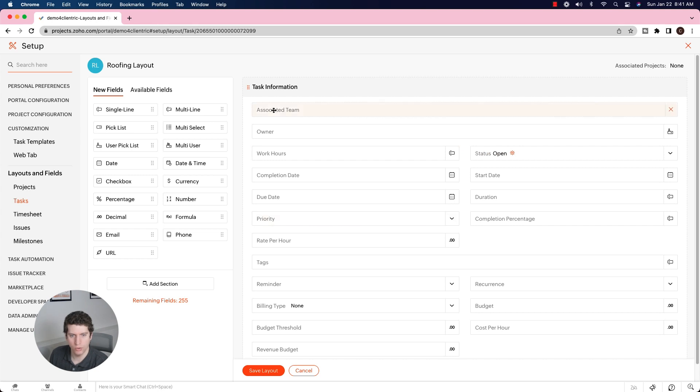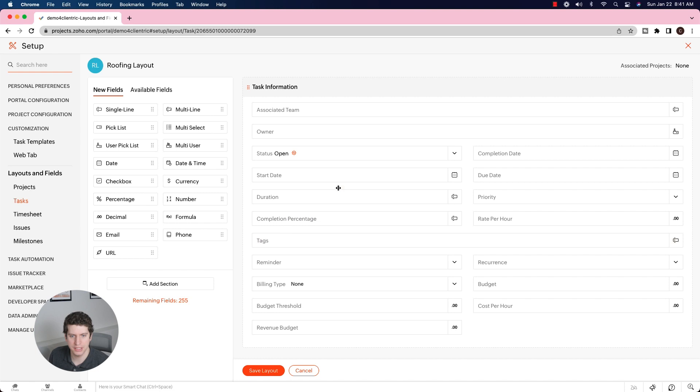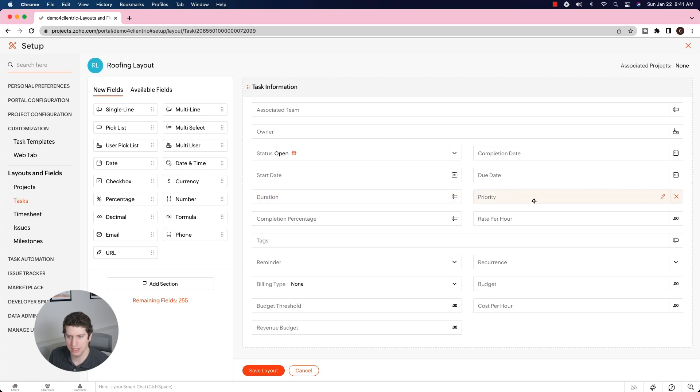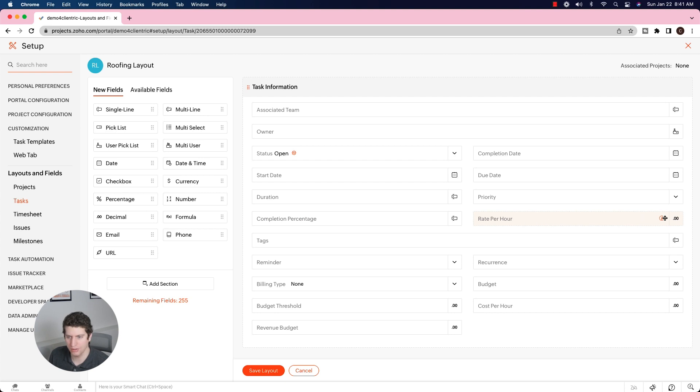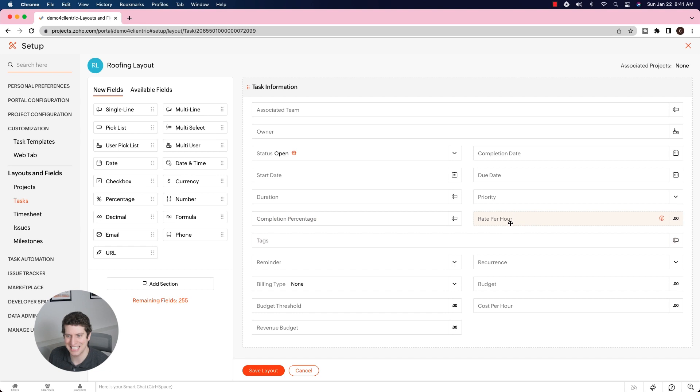So right now we have work hours. Let's say we don't need work hours, so we're going to disassociate that one. We want the status, the completion date, start date, due date, duration. I think we have to keep that one in there. Priority, we can keep that one. Completion percentage, rate per hour - we don't really need that one, but it looks like we have to keep it. Unfortunately, it is a standard field. So some of these we can remove and some we can't.